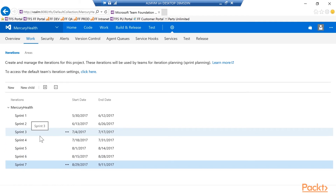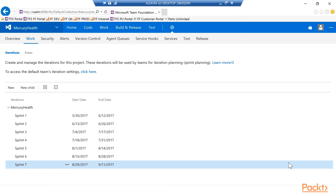It's pretty straightforward — you go through the list creating your sprints and setting dates. The biggest thing is understanding your sprint schedule: how many weeks per sprint? Most folks go two to three weeks, and that's where I like to fall — no more than three, no less than two. People do work in four-week sprints, but I think that's a little too long. For a 90-day project I'd do two-week sprints; for a six-month or one-year project, three-week sprints. It all depends on your project.